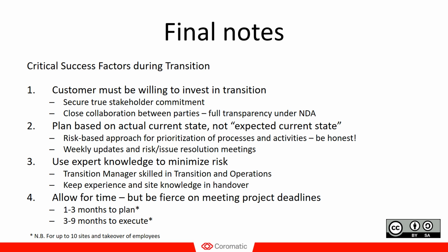And this is up to 10 sites with a couple of megawatts and includes takeover of employees. But if we are talking maybe 100 megawatts or several countries with large and complex sites and different groups of employees, it should probably take between 1 and 2 years in total to execute this. But on the other hand, you would collect quick wins and have both quality improvements and cost reductions already long before the transition period is over.